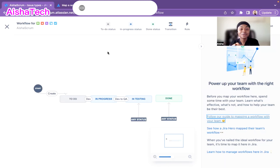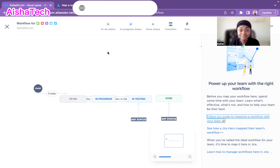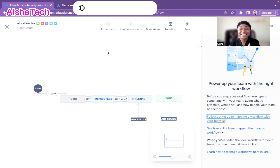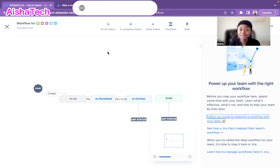As we create a new status, I have to choose which category it belongs to: to-do, in-progress, or done. Regardless of the name you give it, the status category must be very clearly defined together as a team.